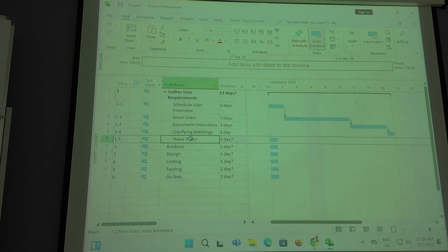You're building a cloud-based system, right? You need to pay for a monthly cloud subscription, correct? So you need to put that somewhere in your project because you need to cost it as well. So maybe you can say, because you want to do development and the cloud service for development is PaaS, right? So PaaS cloud subscription.